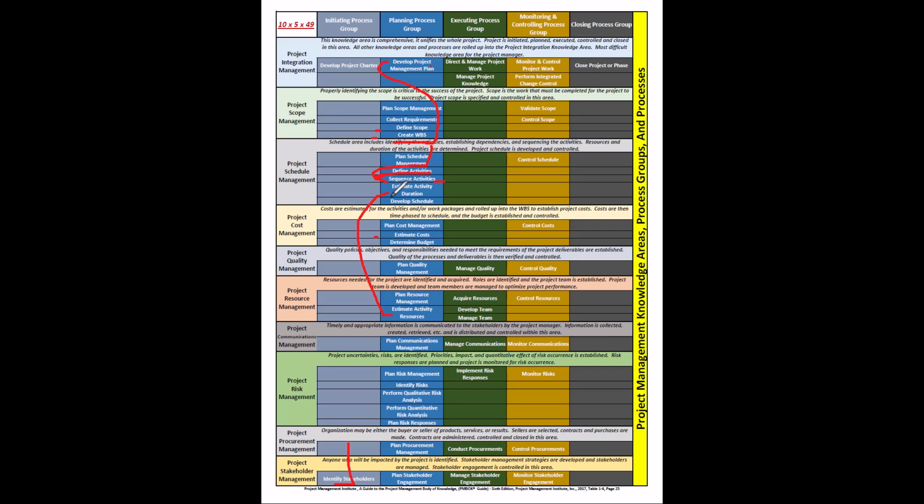If we are a schedule-constrained project, we may add more resources and not worry too much about the cost. So that means add more resources to get it done quicker. If we are a cost-constrained project, then we may keep the resources lower and extend the schedule out. So those are the things that we have to understand as we are estimating activity durations.